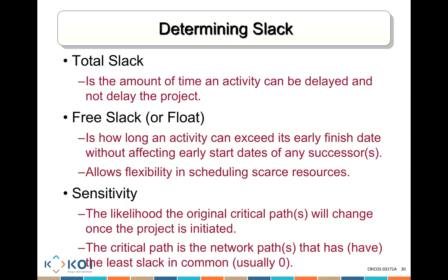That is what we call a sensitive path, which means if that 1 day is delayed, I will now have not simply one critical path, but two critical paths.